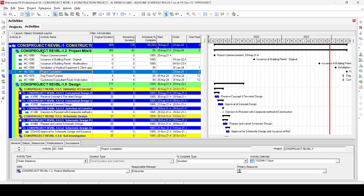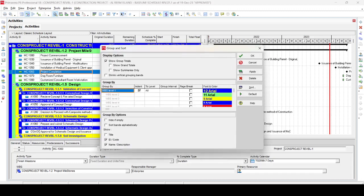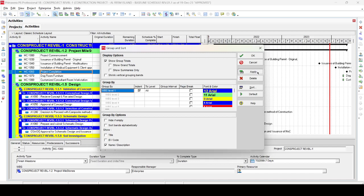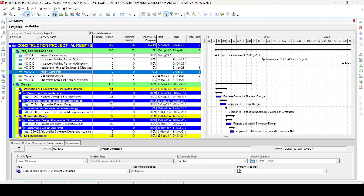To hide the unnecessary WBS ID and code, go to the Group and Sort button and open the Group and Sort dialog box. At the bottom, you will find a 'Show' section where you can see 'ID and Code' — this is the WBS ID and code. Uncheck this option and press Apply. It will remove the code and keep only the WBS name and description.